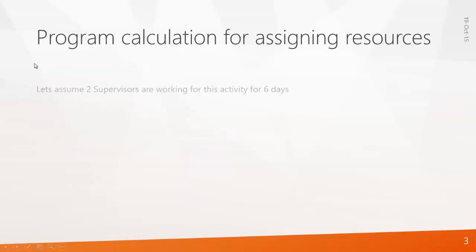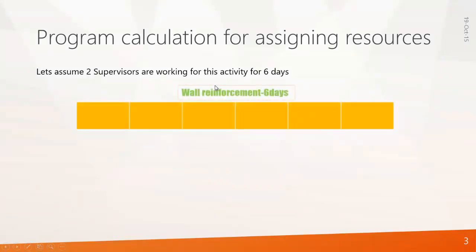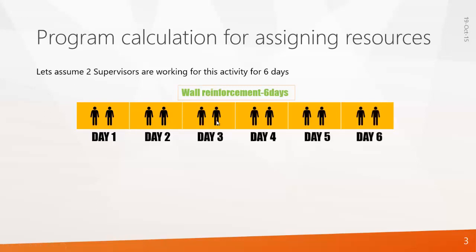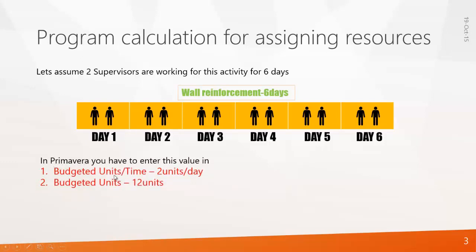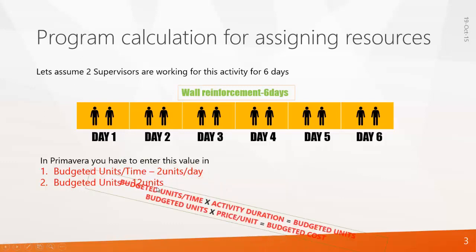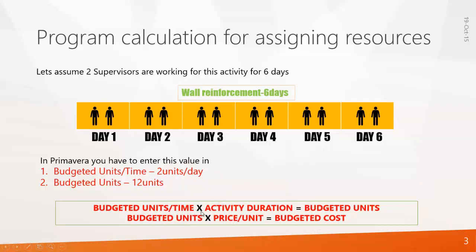Let's assume 2 supervisors are working for this activity for 6 days — Wall Reinforcement, 6 days. Day 1: 2 supervisors are working. Day 2 again 2, Day 3, Day 4, Day 5 and Day 6. So how do you assign resources? In Primavera, you can enter this value as budgeted units per time — that is 2 units per day — or you can enter this value as budgeted units as 12 units. The program calculates based on this equation: budgeted units per time multiplied by activity duration gives you budgeted units, and budgeted units times price per unit gives you budgeted cost. Let's open Primavera and see how this works.